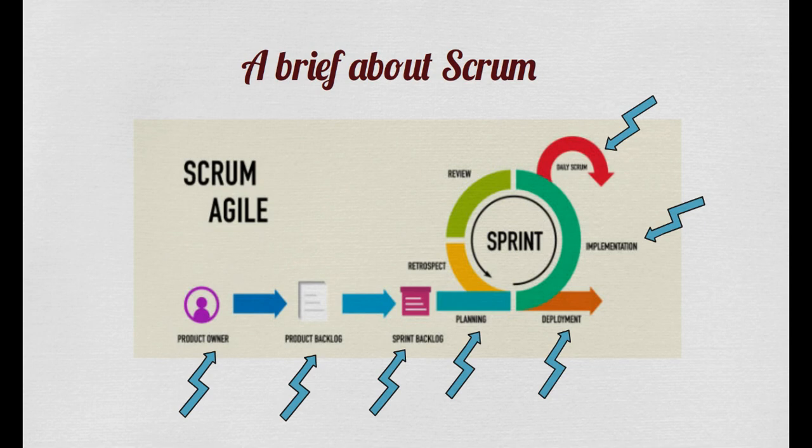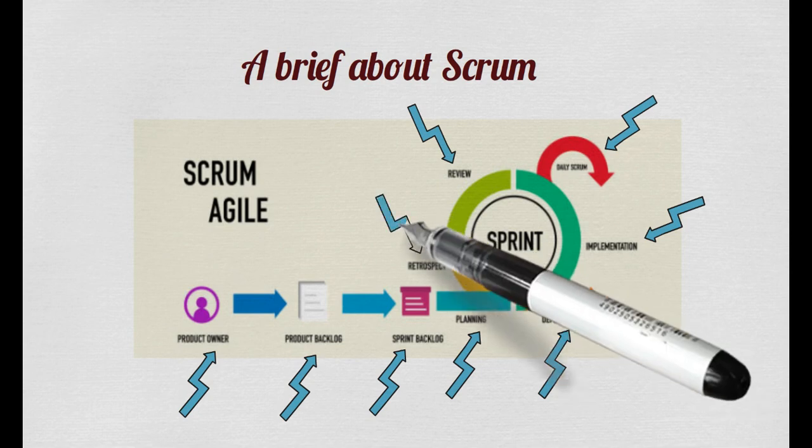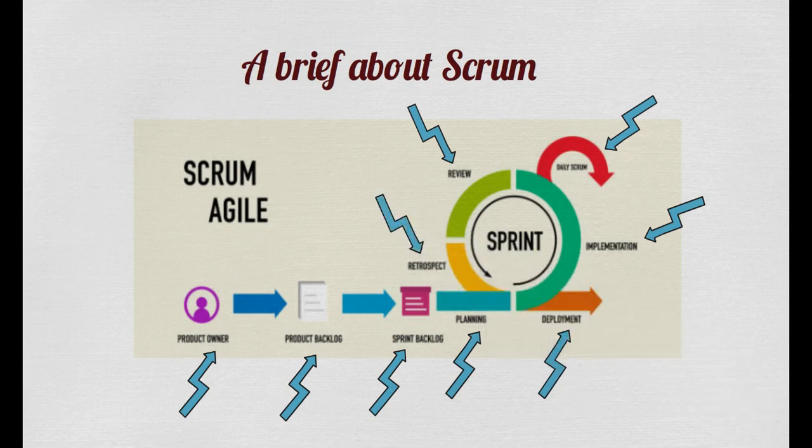Developers will first take the task and mark the status as in progress and provide daily updates on the work carried out in the tasks in the comment section as well as in the daily Scrum calls, also called daily stand-up calls. Once the features are developed, developers will then mark the status of a task as done, after which the feature is ready for a demo to the project stakeholders during the sprint demo or sprint review ceremony, followed by a sprint retrospective where the past sprint is discussed for what went well, what can be improved, and to celebrate the team's good work.